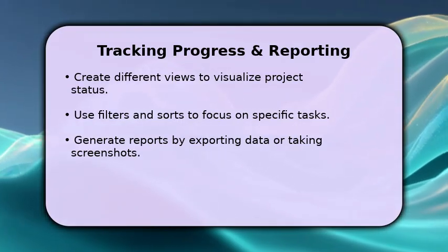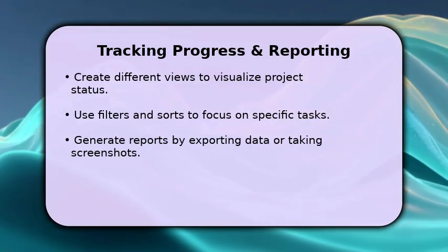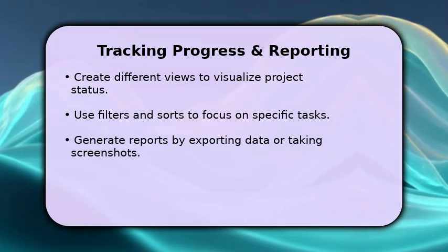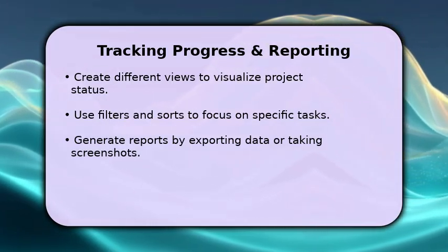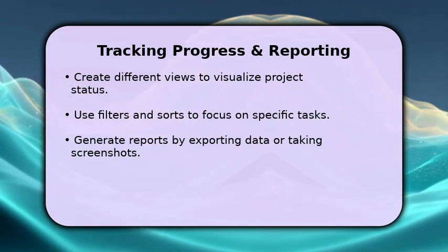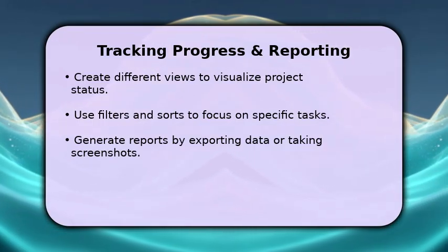Finally, let's track your project's progress and report on it. Create various views, like a Kanban board or a timeline, to visualize your project's status at a glance. Use filters and sorts to focus on specific tasks, such as those due this week or assigned to a particular person. For reporting, you can export your data or simply take screenshots of key views to share updates with stakeholders.